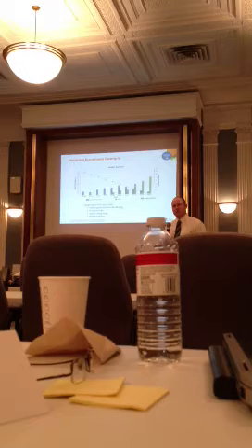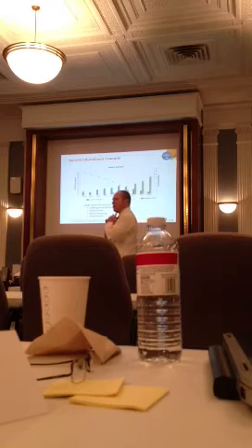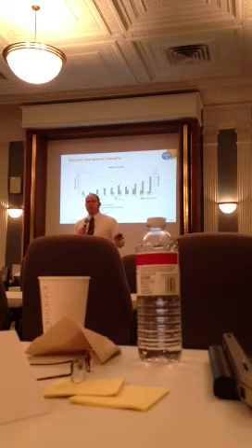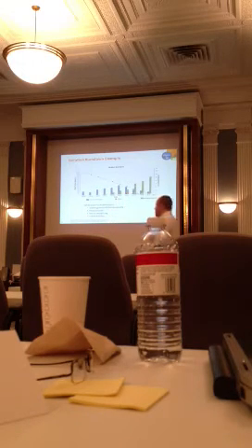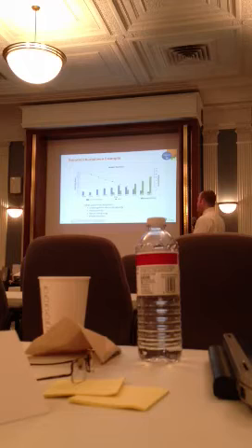Make sense? And that's how I use this information in the retrospective to hopefully drive change and start to get acceptance on day 1 of the iteration. Not only that, but if we're starting to break all this stuff down into tasks, this blue bar on day 1, because now you can see that we've also broken these down, would probably be more like up here.